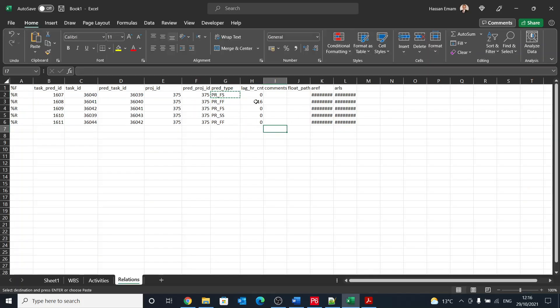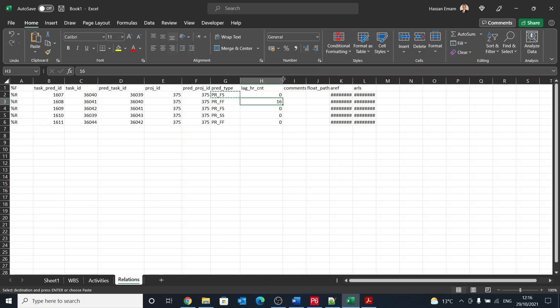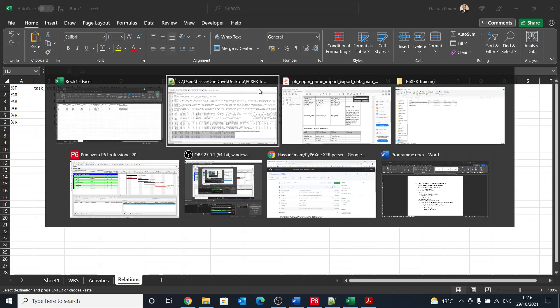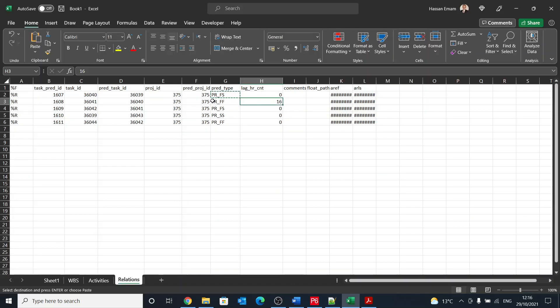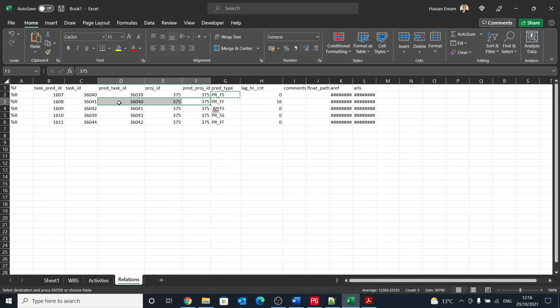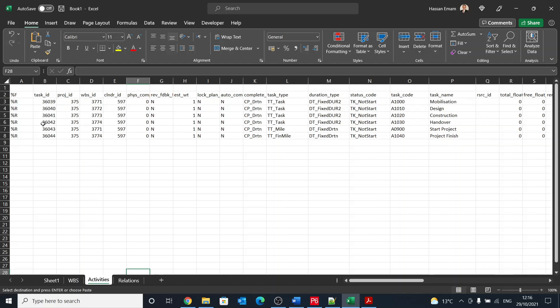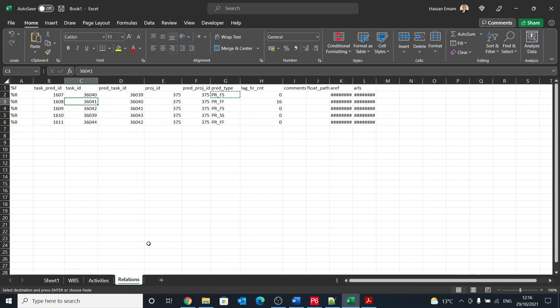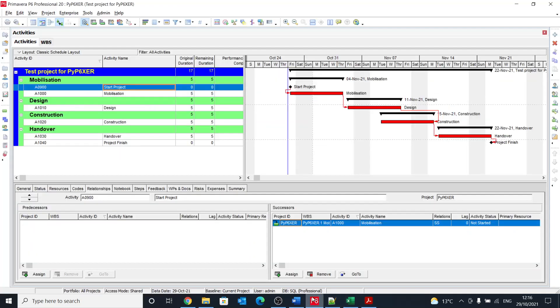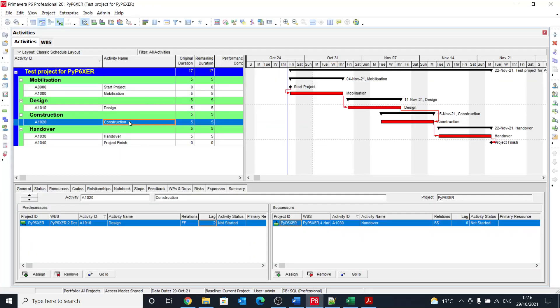It is very important to note that the lag is in hours. So it's called lag_hr_count. So if we check this activity, which is, where, what is the task ID? Yeah, this task ID, it's 36041. So 36041 is construction.